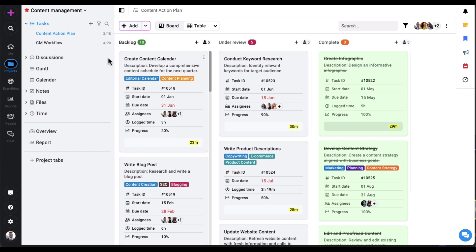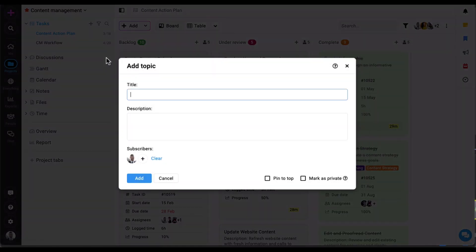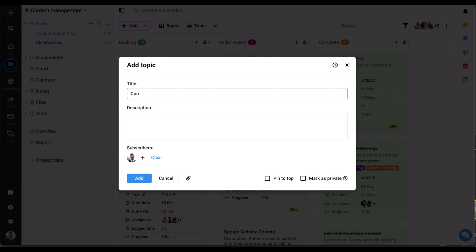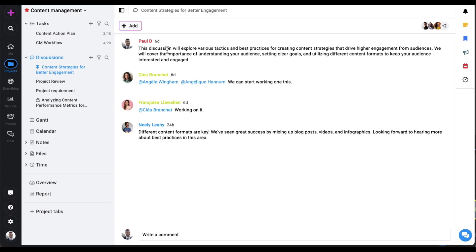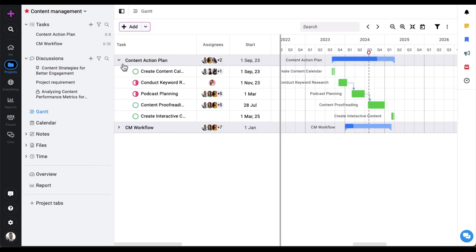To collaborate on project ideas, simply create a discussion topic and participate in threaded conversations which are organized and easy to follow. Gantt charts allow you to create roadmaps, set dependencies, and highlight the critical path.